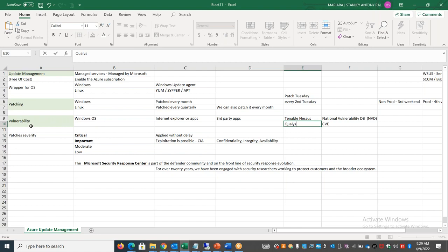Here, vulnerability management, if it is part of your operations contract, then you can take that work. Otherwise, this is going to require a lot of man hours to look into your system, do analysis, how many systems are impacted, and what action plan we need to follow. We have to create a change request for each and every thing that we are fixing. Generally, people mix patching management and vulnerability management together and try to get it completed. But these are two different aspects.